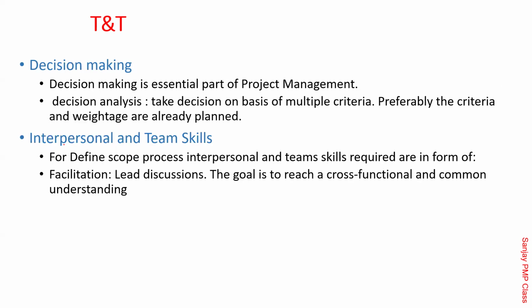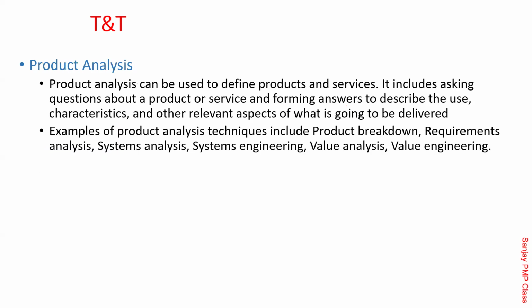Those are the alternatives. Decision making: which requirements are to be taken is based on criteria. As I told you, number of users, the cost involved, the time taken, multiple things, weightages are given, and based on that, these requirements will be taken into the scope. These will be parked there. Interpersonal and team skills are very commonly required. Product analysis is a very common thing used everywhere.